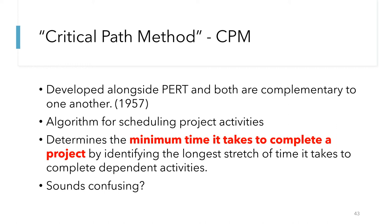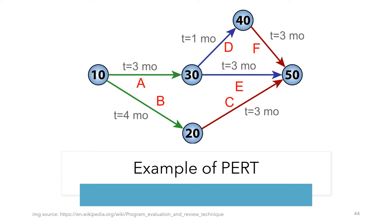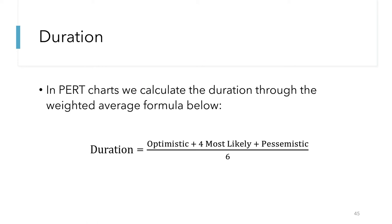This right here is a PERT diagram. This chart represents a seven-month project with five milestones connected by six activities. The milestones are represented in circles, the activities are the arrows labeled A through F, and T represents the number of months before reaching the next milestone. Looking at this diagram, we can see the Critical Path would take seven months for the project to be completed. To calculate the duration of tasks, we use a formula combining the optimistic, pessimistic, and most likely times. We multiply the most likely time by 4 to give it a higher weight, then divide the whole by 6 to get the average duration.